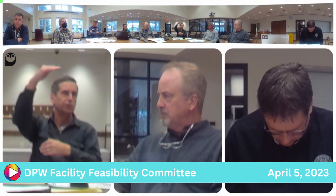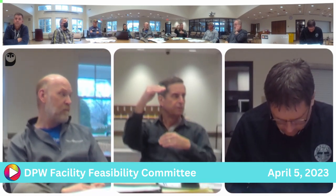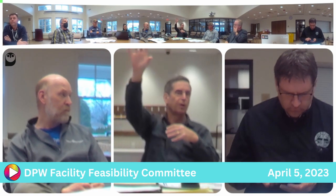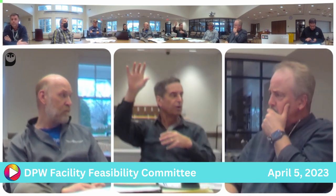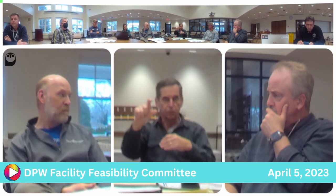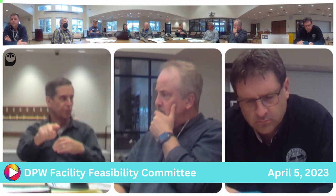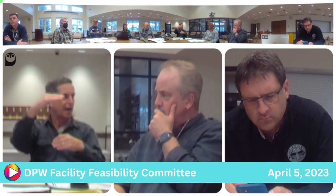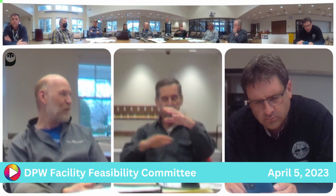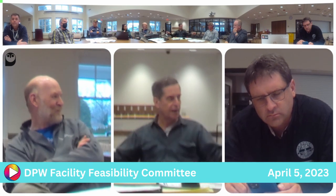So you issue a list of add alternates, 1, 2, 3, however many you have. That's what I was explaining, like the industrial equipment, for example. Number one is your most desired, what you need. They'll quote the base bid; let's say the base bid is $100, and we have $150 to spend. Add alternate number one is $20, so we can add number one. Number two is $100, but number three is $10. You can't pick number three, you have to pick number two. You absolutely have to add your add alternates in order. Typical to Massachusetts, you can't pick 3, 4, and 5 if they're less than number one. You've got to go with number one. If you can't afford number one, you add nothing else.